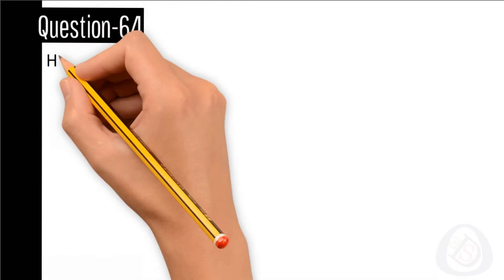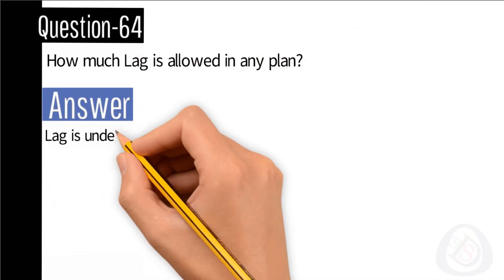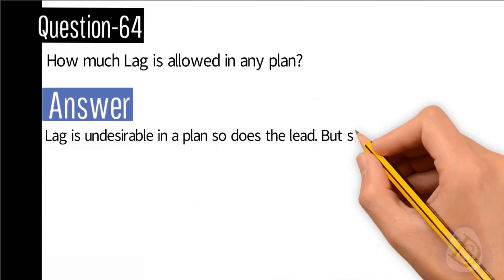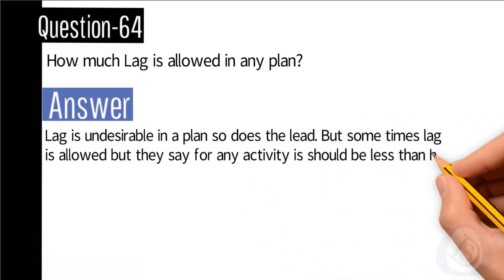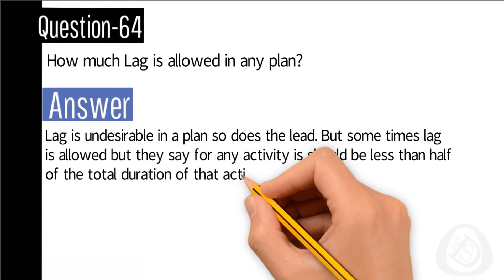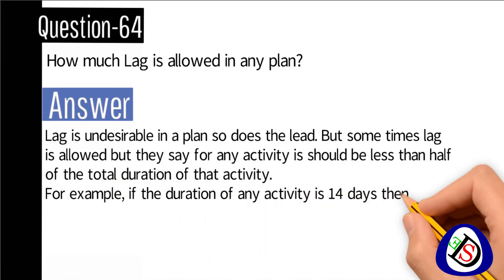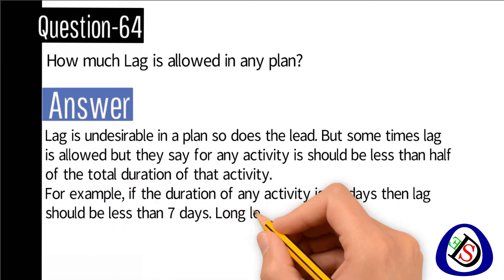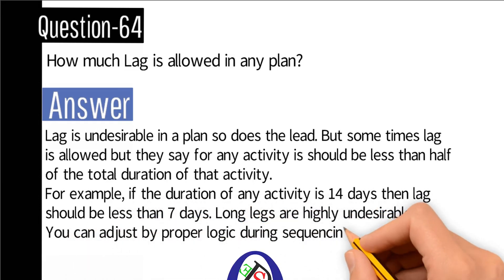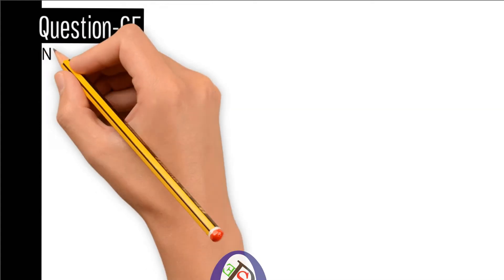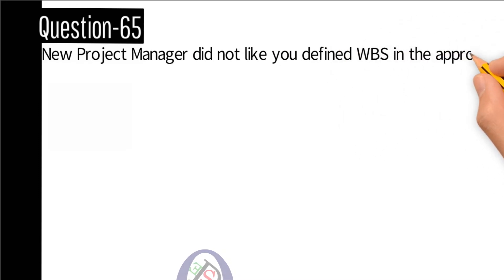Question number 64: How much lag is allowed in any plan? Answer: Lag is undesirable in a plan, as is lead, but sometimes lag is necessary. The rule is that for any activity, lag should be less than half of the total duration of that activity. For example, if an activity duration is 14 days, the lag should be less than 7 days. Long lags are undesirable and can be adjusted by proper logic during sequencing.